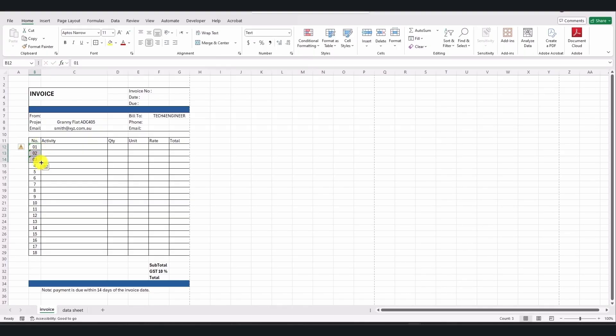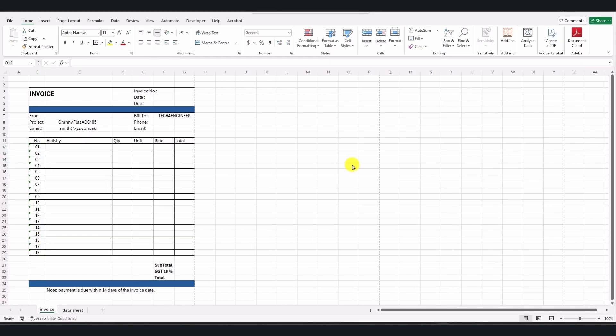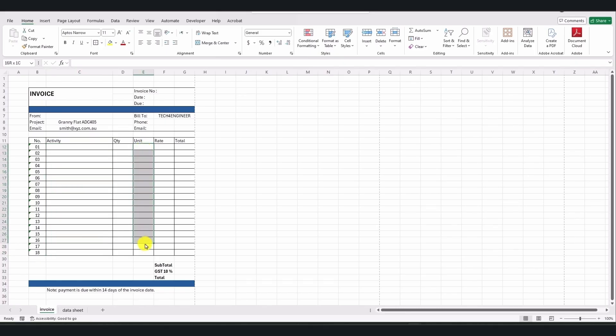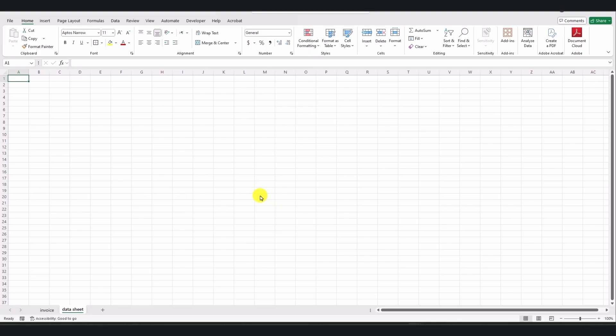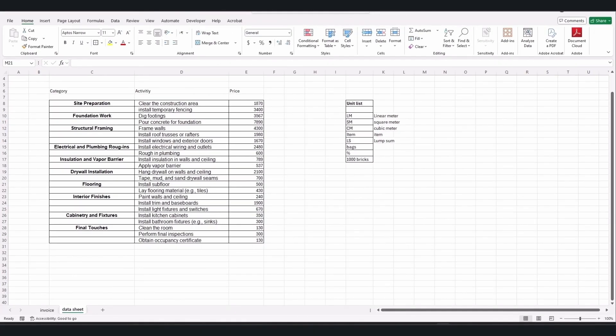The second thing I would like to have in this invoice is the Activity List and the Unit List, where you can select activities and units from a drop-down list. Also, the rates or prices should automatically appear when any activity is selected. All three, the Activity, the Unit, and the Rate, should be brought from the datasheet. Currently, my datasheet is empty. In this sheet, you should include all activities related to your project. You can either write the datasheet manually or copy and paste activities from the bidding document, contract, construction schedule, or estimation sheets, depending on the project.